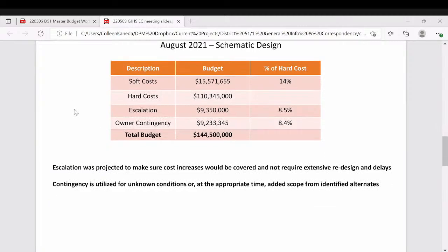Again, as I mentioned, escalation is to make sure that, as we know, cost always increases over time. Sometimes it might plateau, but usually there's a slope with the rate of change of cost. So as long as we're anticipating that, then we don't have to trigger extensive redesign and delays in the project. So we're trying to absorb that as we move through the months. Contingency